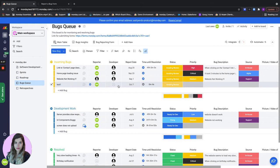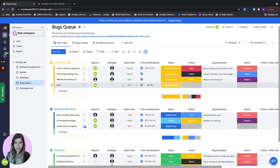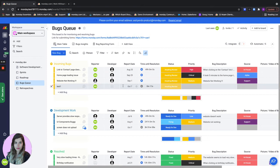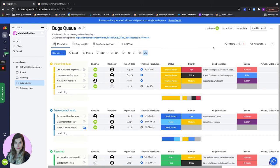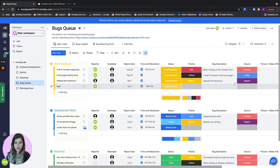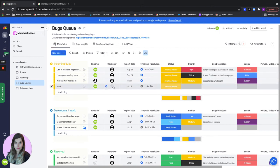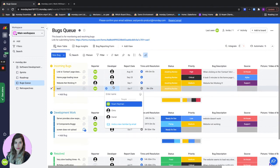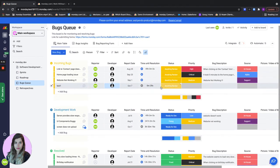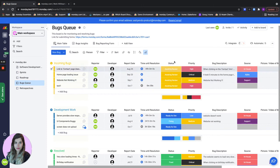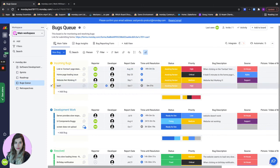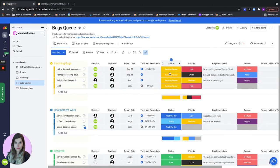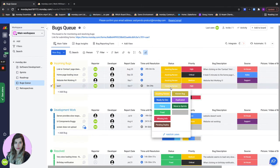Here me as R&D team lead I want to make sure that all the bugs are being handled and I need to decide who will receive the incoming bugs. Someone will need to monitor this or we can create a notification once a new bug has been submitted. Here we want to actually start progressing this. The first thing we want to do is assign a developer to this bug. Let's assign Chris for this one. Once the bug is in I'll set its priority and I want to make sure that Chris gets it and starts working on it.